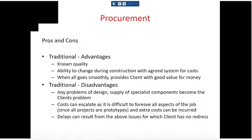We did a project for John Moores University, not this university, and we specified some really snazzy Italian light fittings. And of course, like all of these jobs for universities, it had to be finished bang on September, because that's when all the students were coming back. So anyway, what happens in Italy is they all go to sleep during August, and these fittings just never came. And you couldn't even get to speak to anybody in Italy, let alone hassle them.